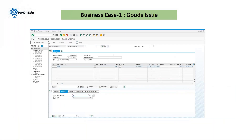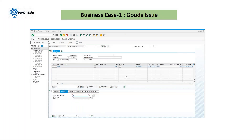When the vehicle driver takes the reservation slip to the storekeeper, the storekeeper checks all the details and issues the material to the driver by creating a goods issue document in SAP. In transaction MIGO, with reference to the reservation, you enter the quantity to issue. Once all data is correct, click Post — the posting entry is done, the material is utilized, and actual cost is posted to the project.